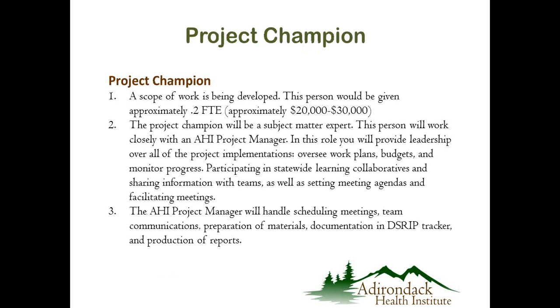And then if you've been on some of Colleen's other webinars today, you'll know that we have a concept out there called the Project Champion. And the Project Champion is, we're developing a scope of work for that, but we do have somewhat of a concept of that here. We're looking at approximately 0.2 of a full-time equivalent. That's what we think would possibly be the amount of time that person may spend on being a project champion for one of the DSRIP projects.